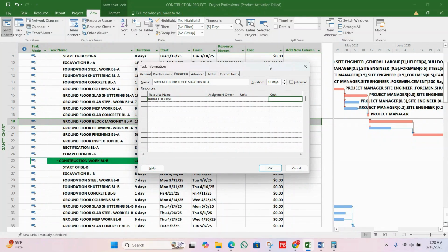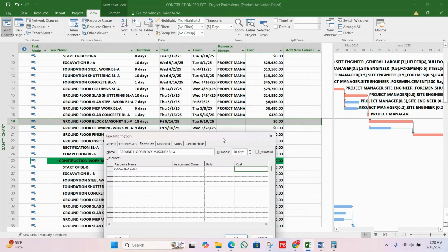I will assign it here, because for this technique or method you should do some homework. If you want to make your schedule cost, or task cost, equal to the BOQ, you can use this technique as well. Let's suppose we have already calculated, and its cost is lump sum, let's suppose 20,000. Okay, the ground machinery work. So I will put it like this.